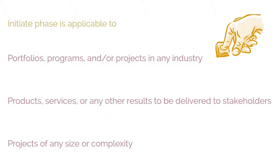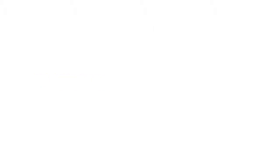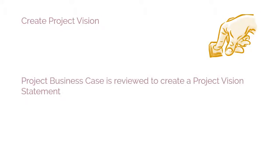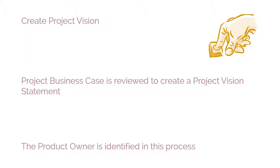Let's briefly understand each process that is a part of the Initiate Phase. The first process is Create Project Vision. In this process, the project business case is reviewed to create a project vision statement that will serve as the inspiration and provide focus for the entire project.